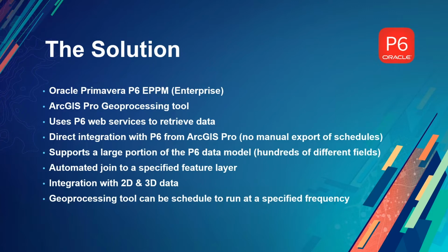Now what we're doing is automatically merging that data with a user-defined feature layer in ArcGIS. So you can visualize, symbolize, and publish to a web map or scene. It can be 2D or 3D, allowing you to do some construction sequencing over time, even in 3 dimensions. And lastly, since it's a geoprocessing tool, it can be scheduled to run at a specified frequency, perhaps providing daily updates.